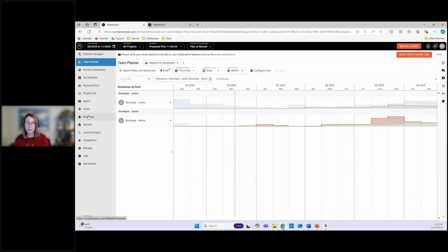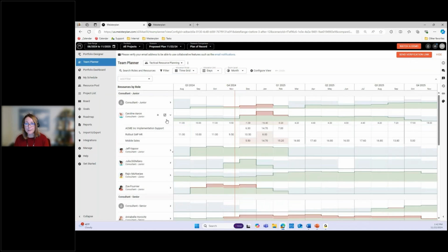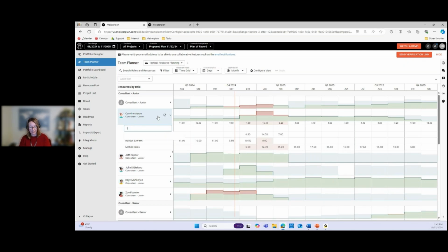Another influencer of availability and capacity is what I would say is time away from projects. So for example, if you have people that need to work on other things, maybe support, maybe smaller projects, run the business, sometimes it's called business as usual, each person should have one of these placeholders. I have a couple here set up in our demo, and it would allow you to reserve a percentage of their time. Say 20% is for run the business.